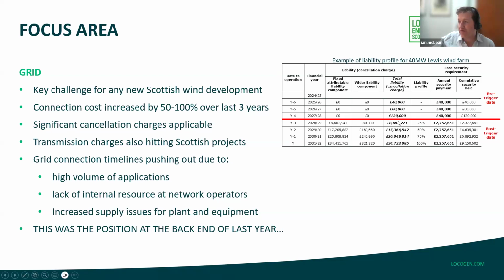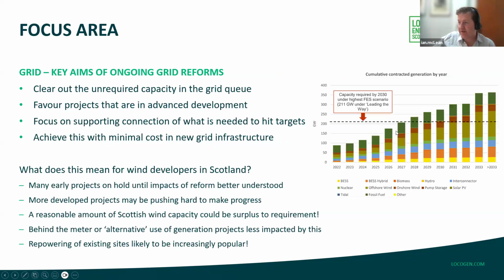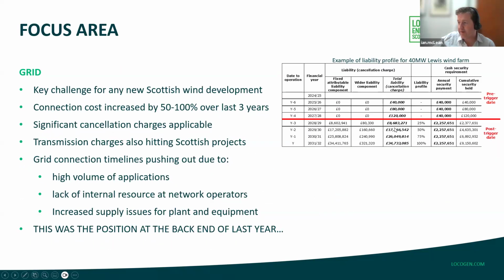But once you go through the trigger date, the cancellation charge jumps to 8.5 million. So this is one of the key challenges that developers are thinking of, and again highlights the importance of ensuring that you have a viable project that you are committed to if you are to go through this trigger date.